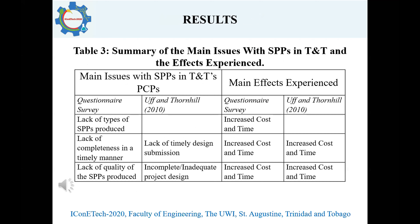Now onto the results of the study. Firstly, we needed to identify and confirm the main issues with subsidiary project plans in public construction projects of Trinidad and Tobago. We took data acquired from both the questionnaire and the Off Report and did a comparison to see if there were any similarities. Both the questionnaire and the Off Report showed that a lack of completeness of subsidiary project plans in a timely manner and lack of timely design submission resulted in increased costs and time on projects. Further, the lack of quality and incomplete project designs also resulted in increased costs and time. Both data sets corresponded, confirming these as the main issues.